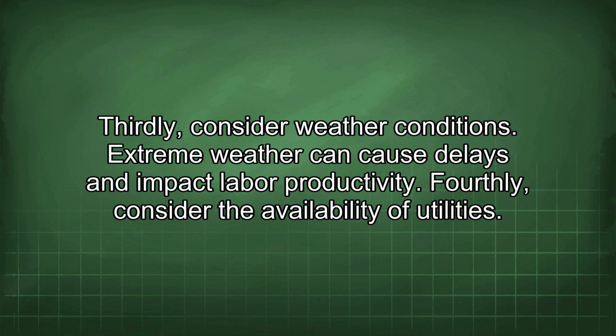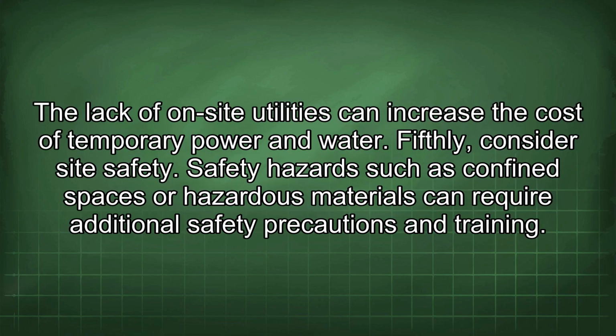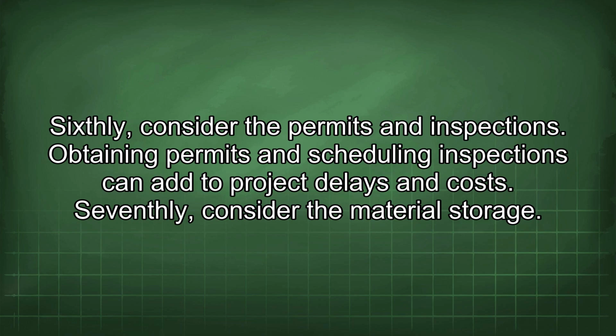Fourthly, consider the availability of utilities. The lack of on-site utilities can increase the cost of temporary power and water. Fifthly, consider site safety. Safety hazards such as confined spaces or hazardous materials can require additional safety precautions and training. Sixthly, consider the permits and inspections. Obtaining permits and scheduling inspections can add to project delays and costs.